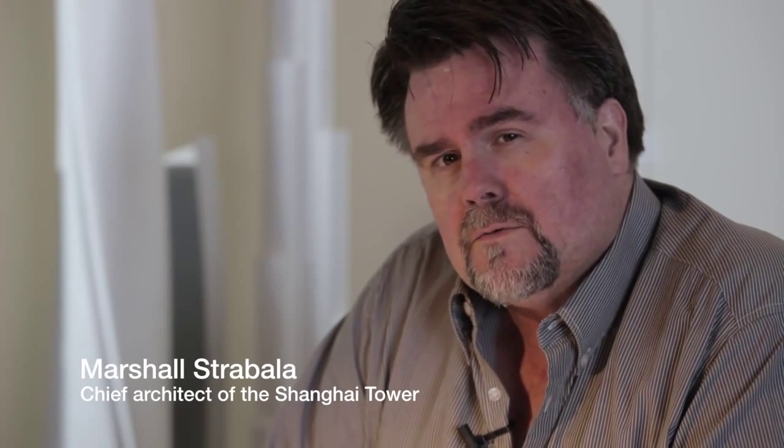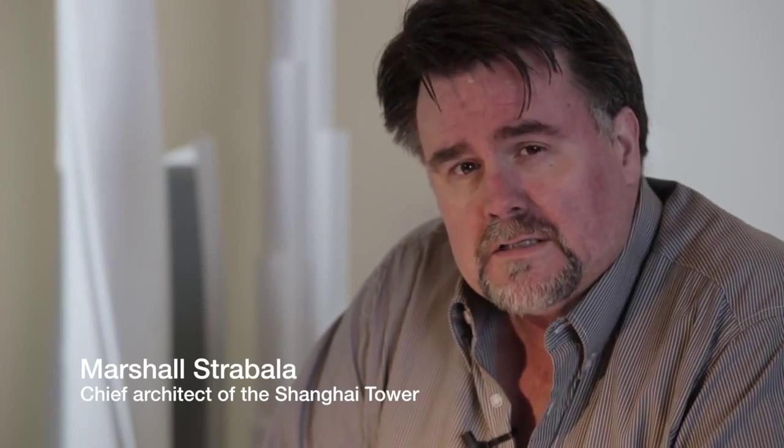It is the 18th of June, 2014, and we're here to talk about the Shanghai Tower. This project's been going on for 8 years, and the core was topped out in August of 2013. So a lot has been done since then, and in the last year of construction, there's a lot of simultaneous things going on. The superstructure, steel and concrete work should be completed by the end of the year.